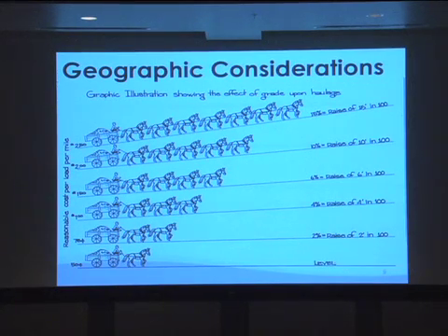Be open up front with how you're calculating your unit prices, what's in them, and also what is in your contingency or risk. It's okay to have 4, 5, 6, 7, shoot, 20 individual contingency lines and what each one represents. It's called the basis of estimate, so we can be upfront with our costs.